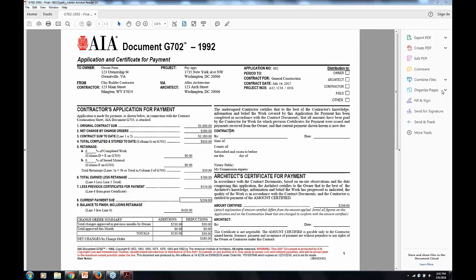So here's a question about store material. When you moved a portion of the store material amount and then put it in the current month, wouldn't the customer have already paid the store material amount since it adds in the total billing amount? You would then be invoicing the amount in the second month that you put in the current payment. So the answer to the first question is yes, the customer would already have paid it, but it's not double billing because it's already been paid.